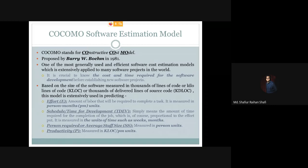This COCOMO model is extensively used in predicting the following four things: software project size, which is measured in thousands of lines of code or kilolines of code called KLOC, and also called thousands of delivered lines of source code or KDLOC, depending on the size of the software code.